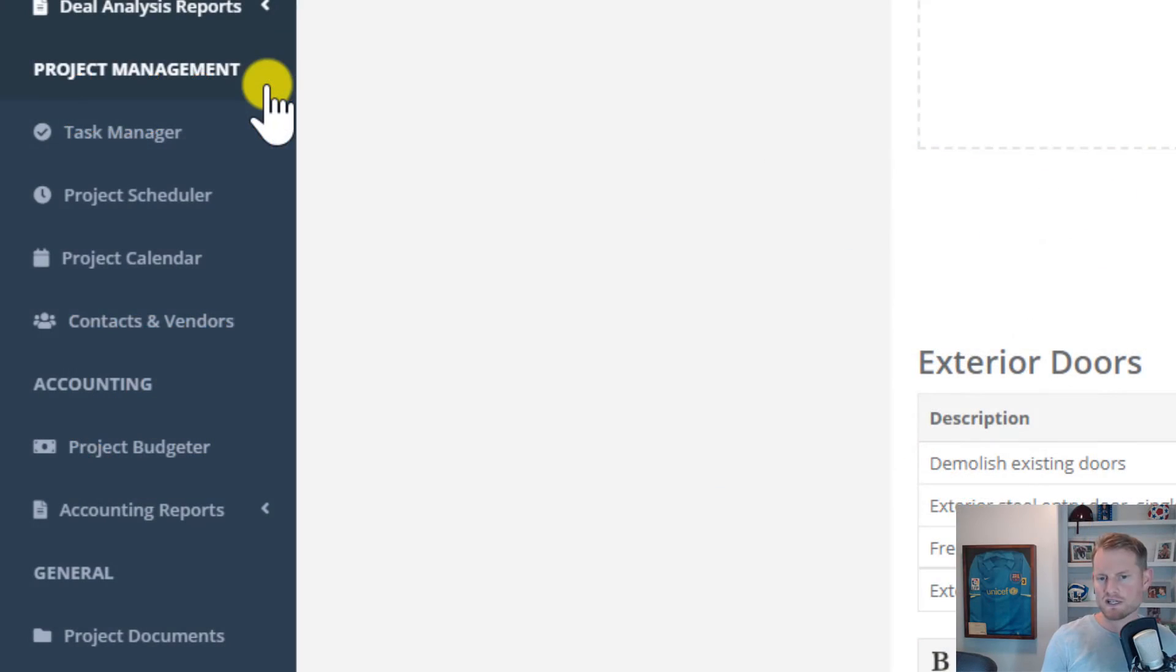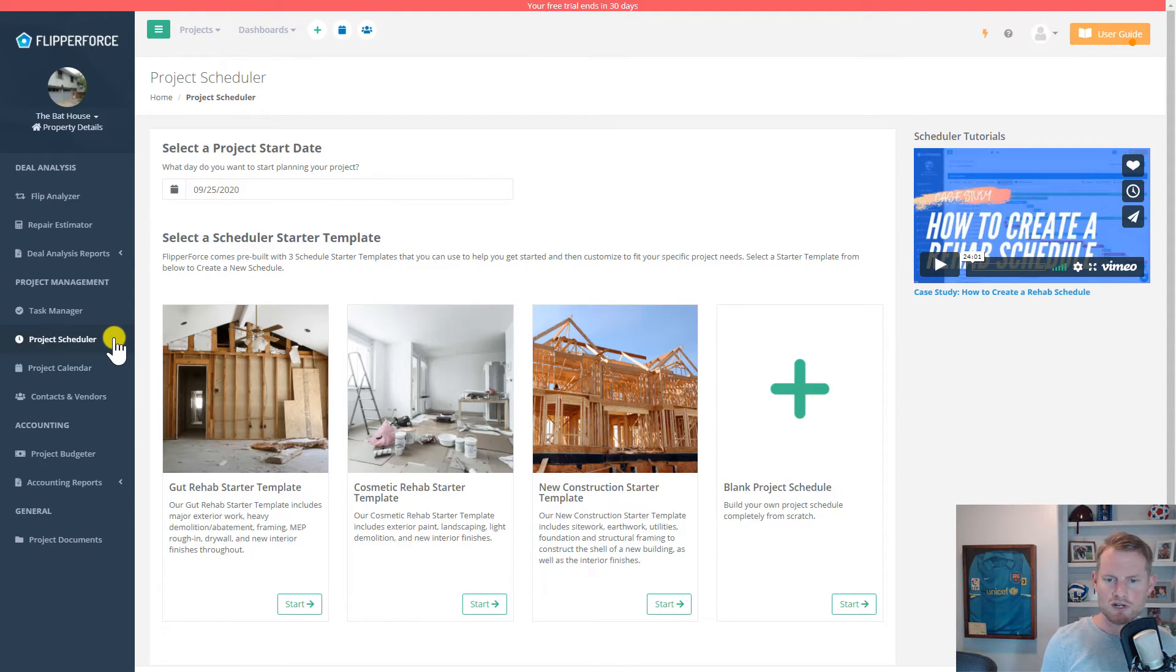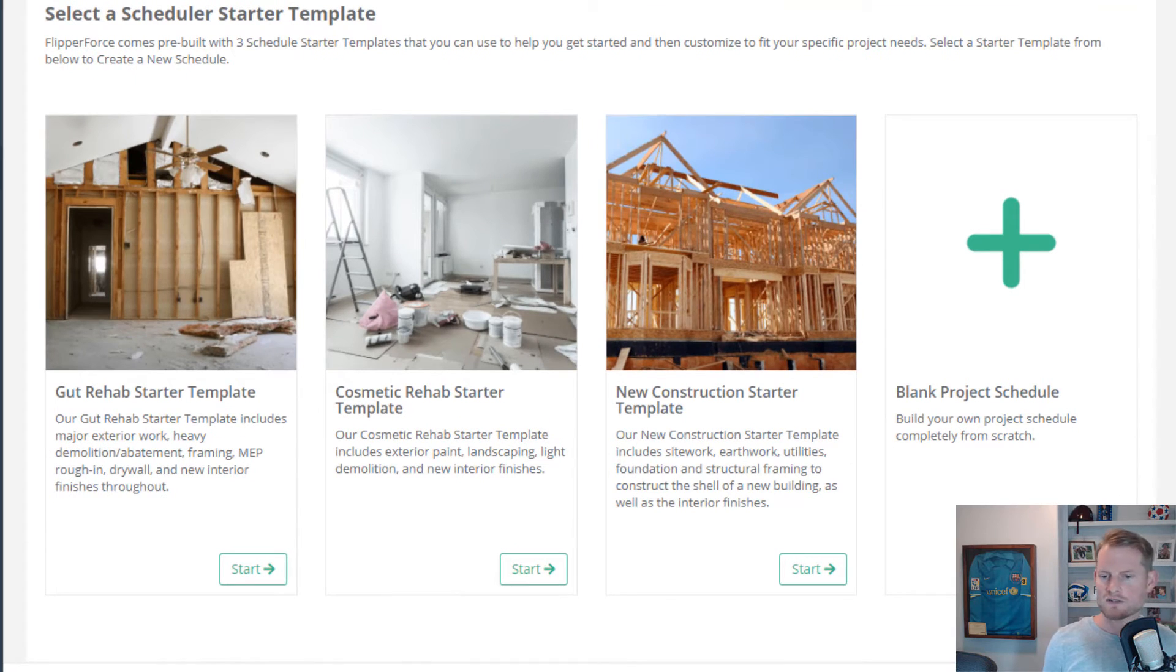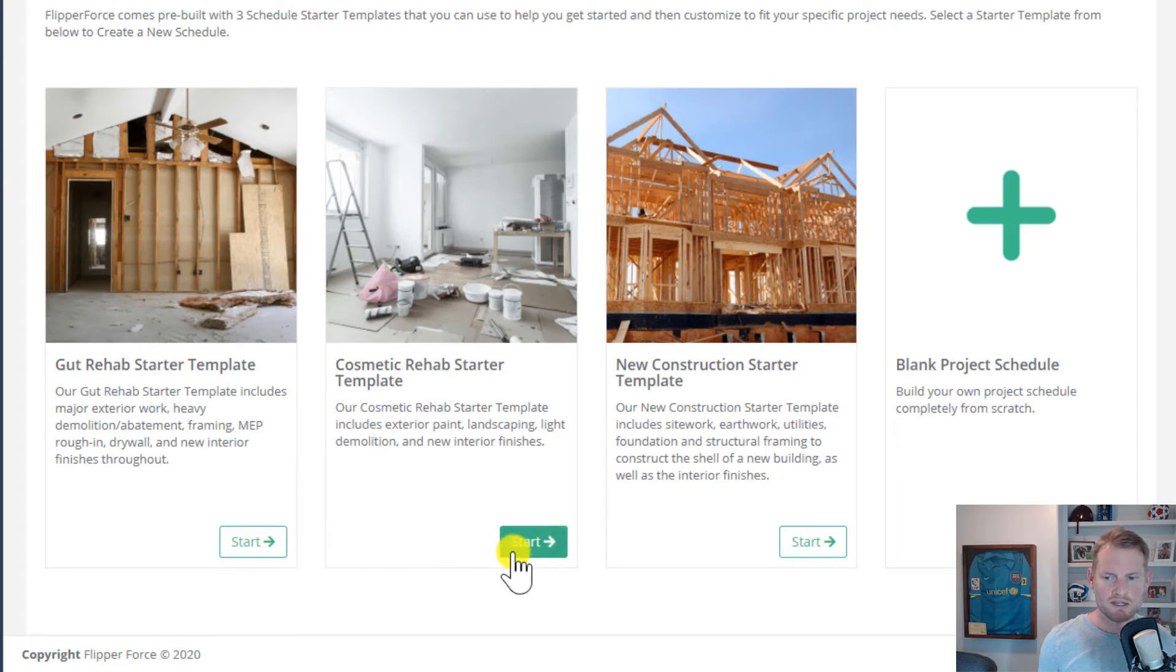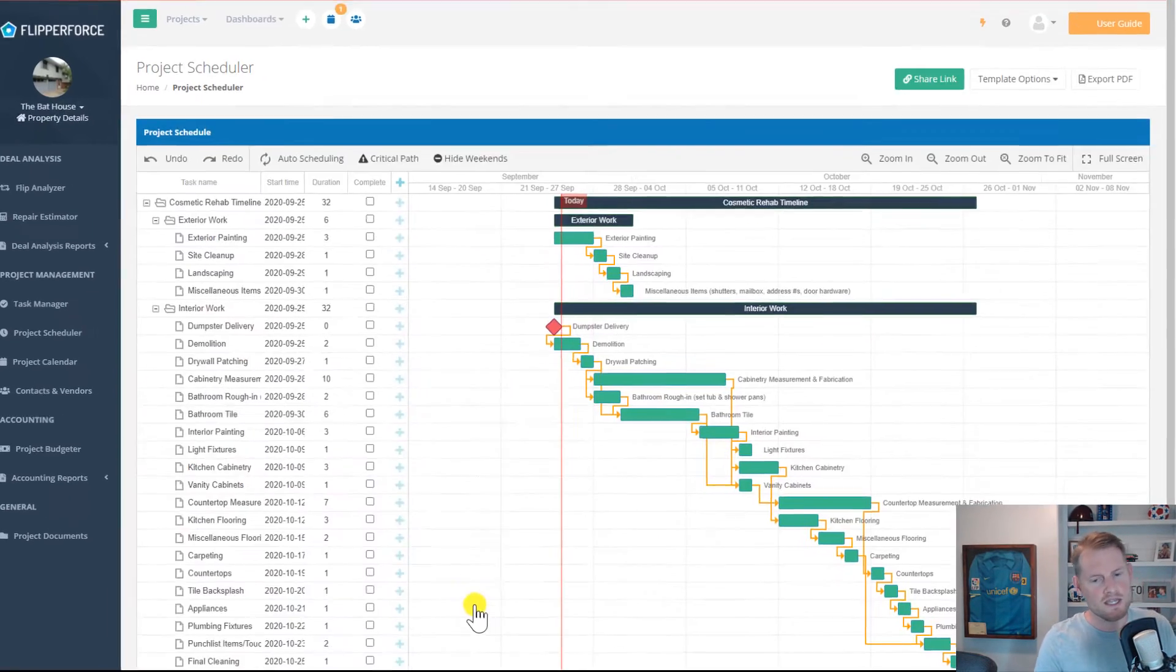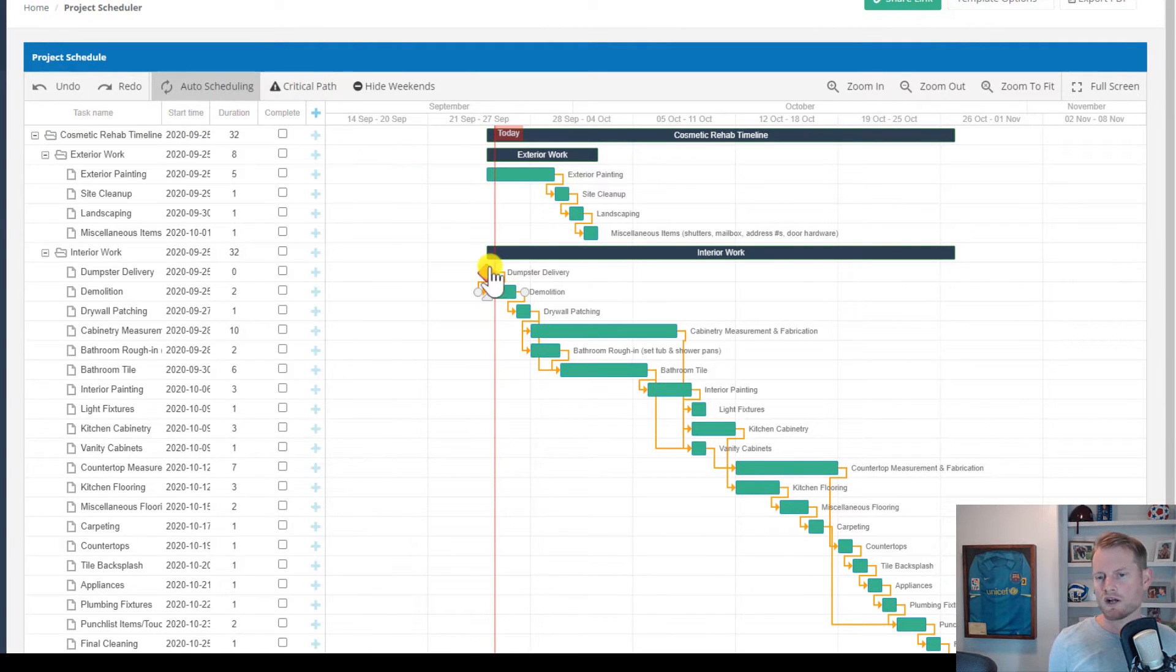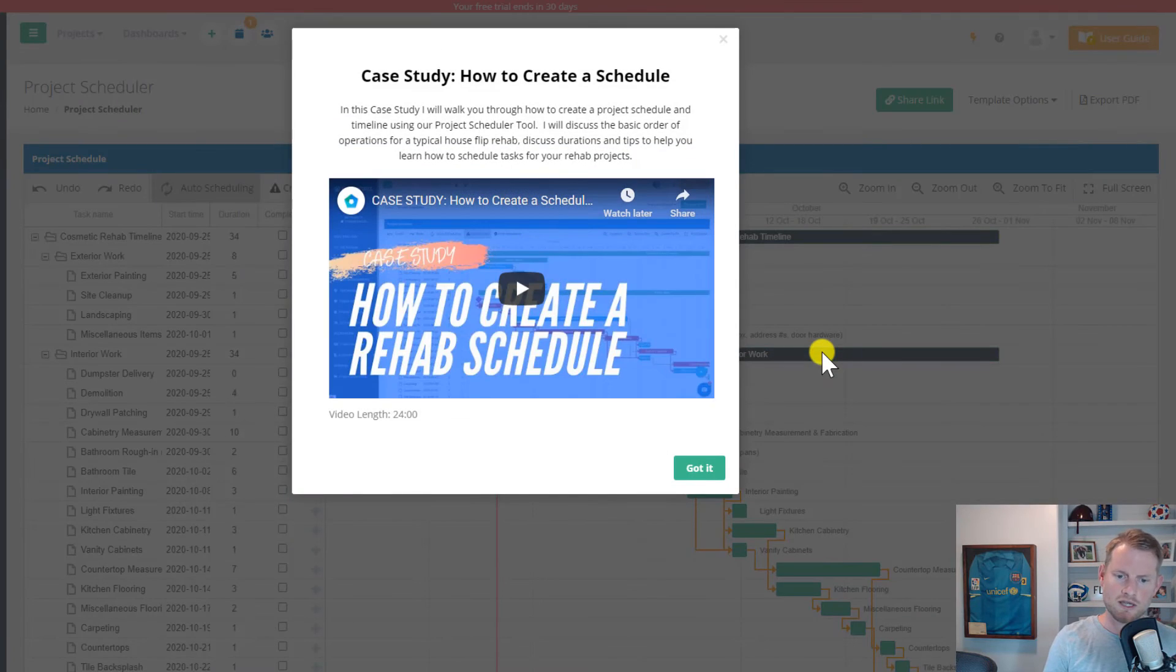Our project scheduler can be used to plan and build your rehab timelines, schedule your contractor start and completion dates for all of the major construction and renovation tasks that need to happen on your project. To help get started, our project scheduler includes multiple schedule starter templates for rehabs and new construction projects. We've got a template for a gut rehab, a template for cosmetic rehabs, and a new construction template that you can quickly load into the project scheduler in a matter of seconds. And yes, if you are wondering, we do have a case study on how to create a project schedule completely from scratch, which you can find in our user guide, as well as our website and our YouTube channel.